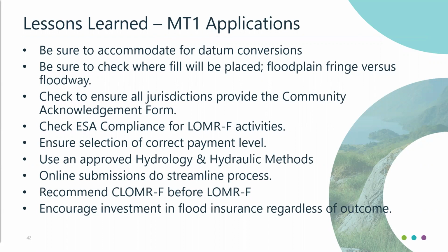Make sure that all jurisdictions get a community acknowledgement form. If your development is within a county and a community, make sure that you get sign off from both the county and the community. That's another thing that we've seen in the past, where they'll submit for the community because eventually maybe it will be platted in with the community. But I have seen that come back where FEMA or the reviewer will basically say, well, right now your site is located within the county and the community, and therefore you need both of them to sign off on it.